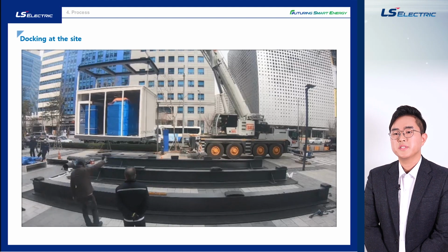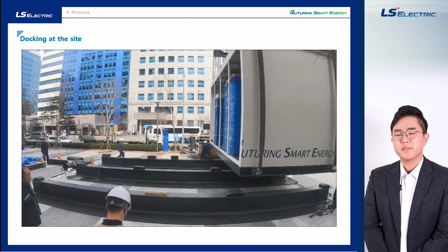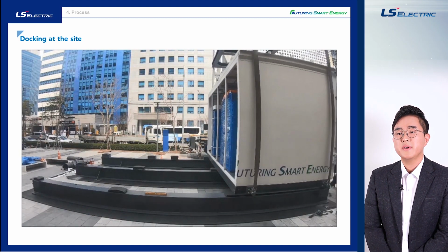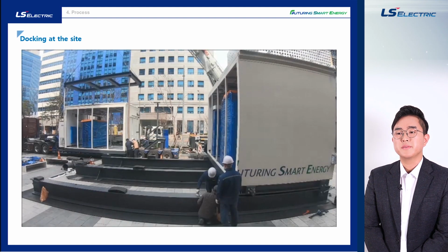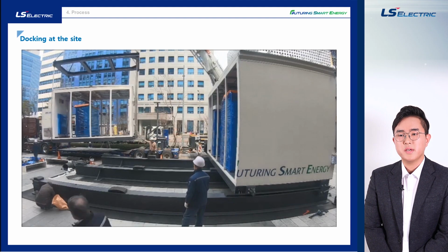This video shows the installation of an interlocking type E-house on site, which is unloaded with a crane onto the finished floor. Since it's fully tested in advance, the system can be operational within a short period after cabling and a simple field test.